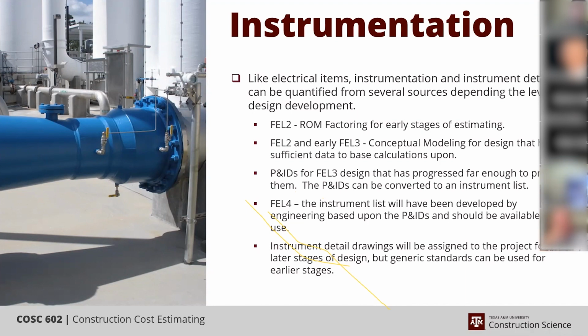SmartPlant 3D and some of the other programs exceed it in detail, exactness, and accuracy, but those are design tools, while ACE is a conceptual modeling tool to fill the gap until engineering can bring the design and the actual model along to a point where it can be utilized.